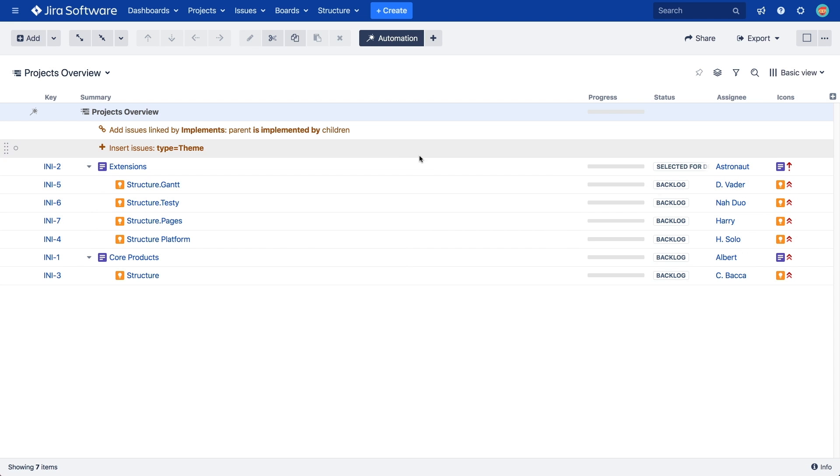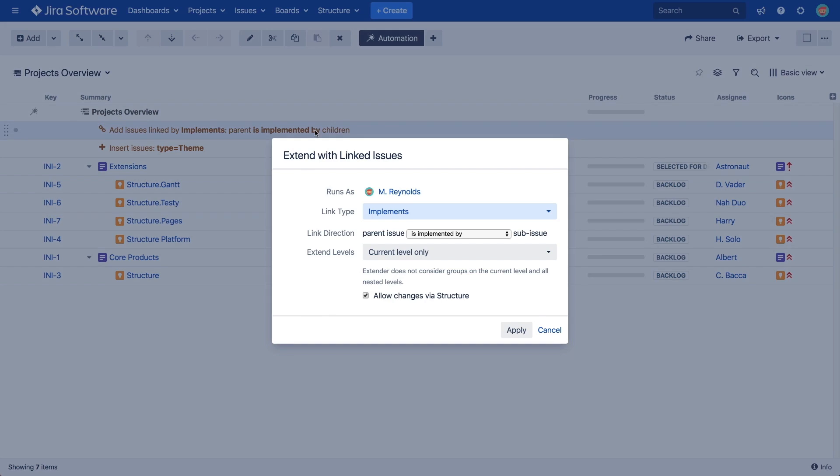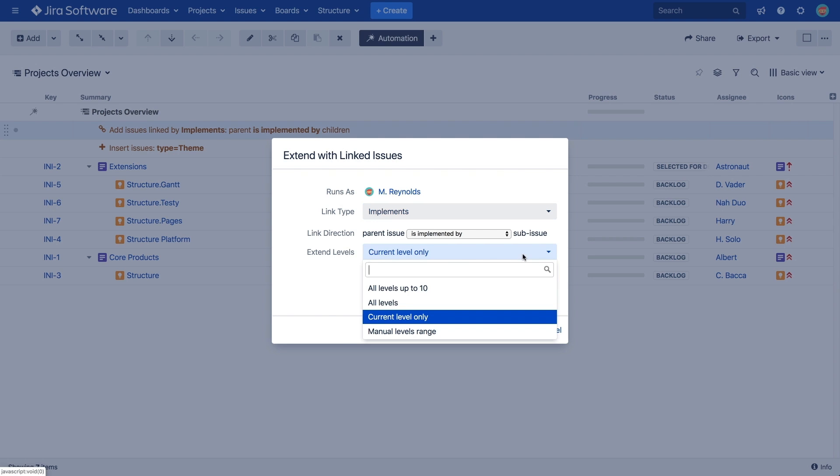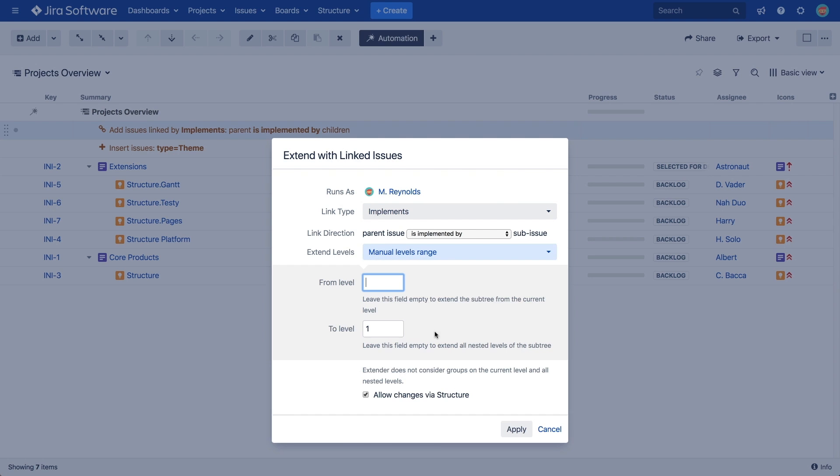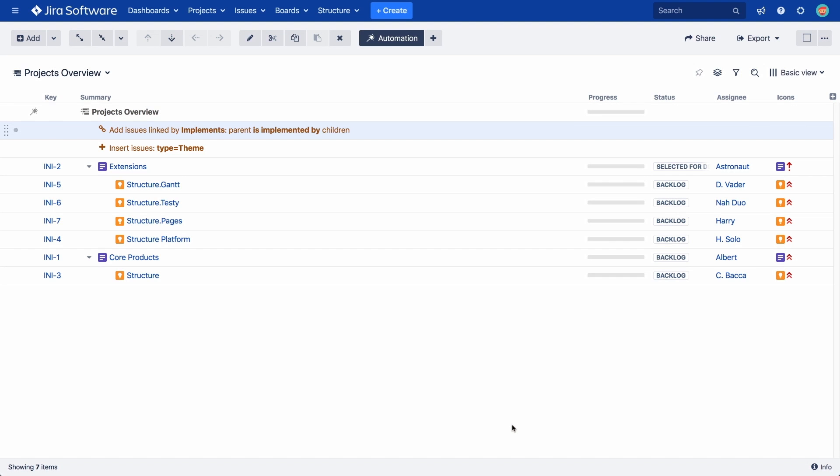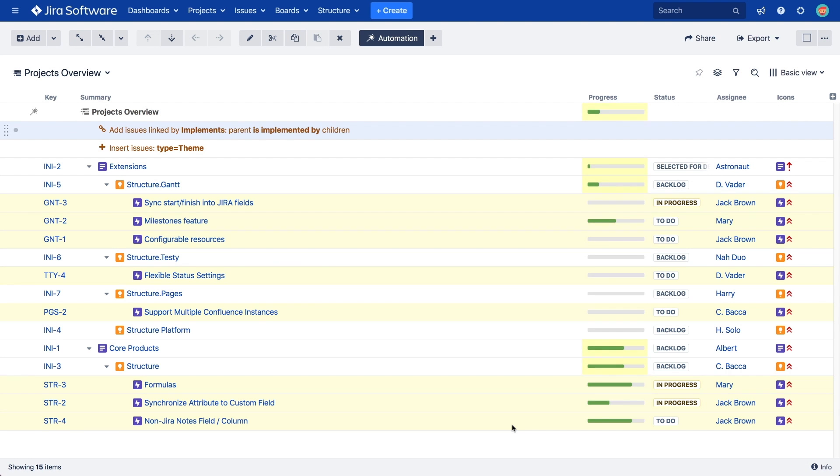To do that, we double-click the Extend generator and change the level setting to Manual Level Range from Level 1 to Level 2. Now, our extender will also check the issues on the second level and add their children as Level 3. When we click Apply, you can see that our epics have now been added.